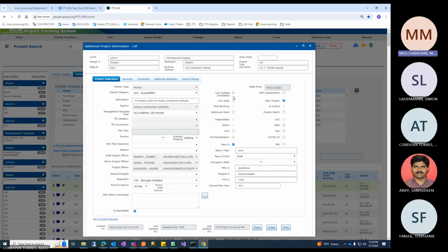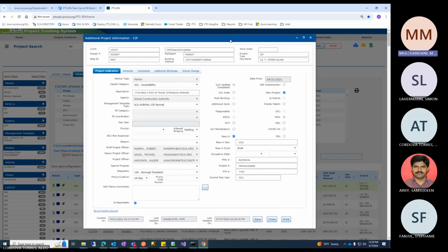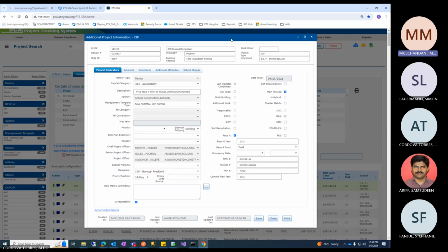Usually the status is associated with dates. So when the dates get changed, the status gets changed. The dates get changed mostly via PPM. So the status change mostly happens via dates entered in PPM, but then there are exceptions where the date does get changed based on some other factors, then this being the first one.